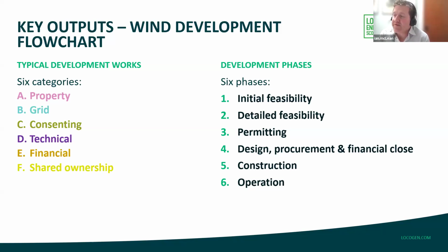So in terms of the development phases, we'd set out initial feasibility, which is your initial proof of concept that the project has some legs. Detailed feasibility, which digs into more details on key risks and looks to understand if those can be overcome.